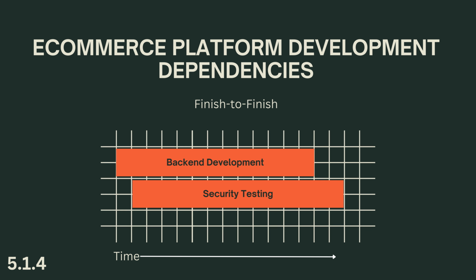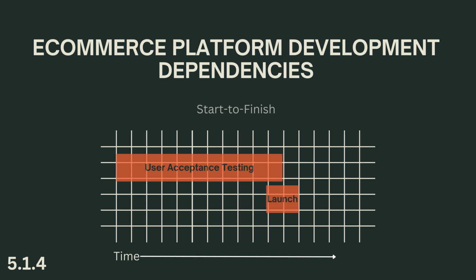Security testing cannot be completed until back-end development is finished. While security testing can start earlier, the final security approval can't be given until all back-end development is done. You need to ensure that every part of the completed back-end is secure.